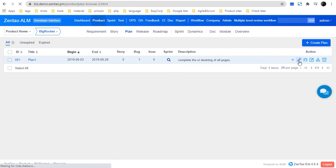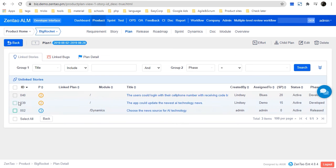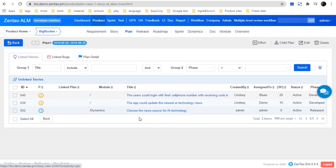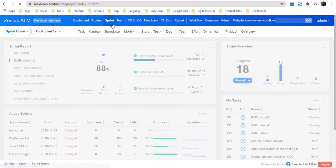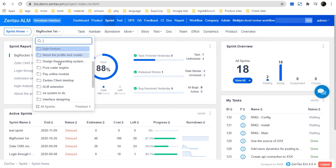Here is the 'Link Story' option. As you can see, I have already linked these stories to this plan. The next step is for the Scrum master or the team — let's go to Sprint. The Scrum master should create a sprint. In Scrum, a sprint usually lasts one to two weeks or even one month, but should not be any longer. You can view all the sprint list by clicking the sprint name.